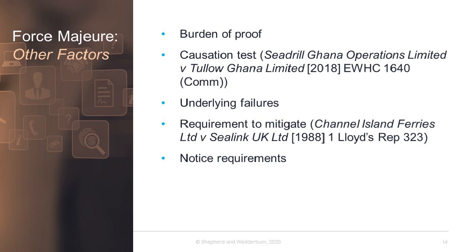In that case, the court stated that the affected party would need to take into account the commercial interests of the innocent party as well as its own when deciding what steps it can and should take to avoid or mitigate the force majeure event. The Court of Appeal in the Sealant case also said that any clause which included language referring to events beyond the control of the relevant party could only be relied upon if that party had taken all reasonable steps to avoid its operation or to mitigate its results.